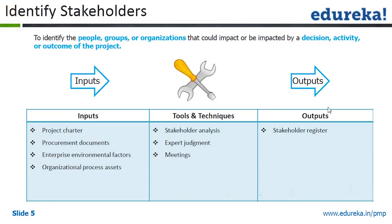To identify project people, groups, or organizations that could impact or be impacted by a decision, activity, or outcome is the identification of stakeholders. The inputs are the project charter, documents, procurement documents, enterprise environmental factors, and organizational process assets. Tools and techniques include stakeholder analysis, expert judgment, and meetings. The output is a stakeholder register.